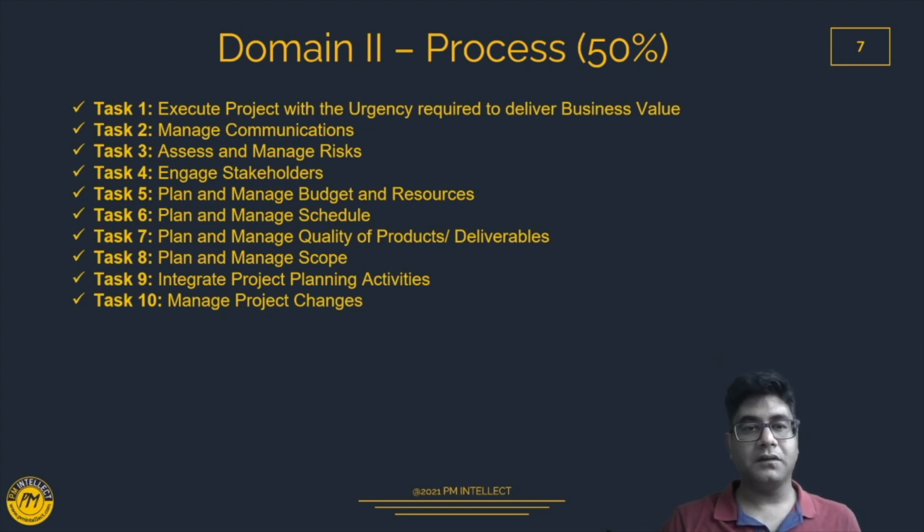Changes impact the project in two ways. First, you manage the changes, where based on the change which is occurring, you take some steps in order to ensure that you are still back on track, your baselines are intact, and you are managing the project the way it has been planned to manage. There are other changes which are going to do the course correction, where you are going to change your baselines, amend your plans, and ensure you are still moving in the direction in order to ensure and achieve the business value as you have planned.